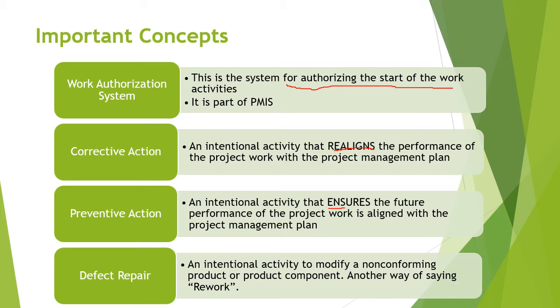So preventive action refers specifically to any action in which the project manager provides documented direction to perform an activity that is meant to reduce the probability of negative consequences associated with the project risk.